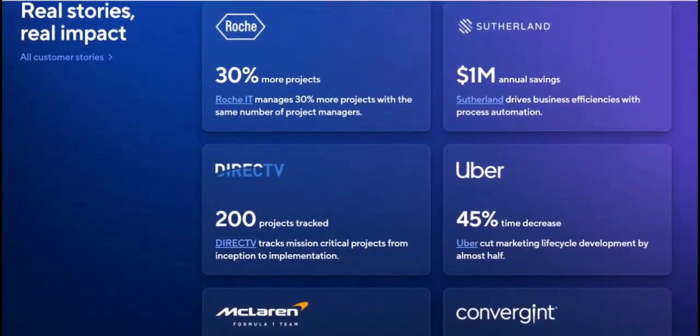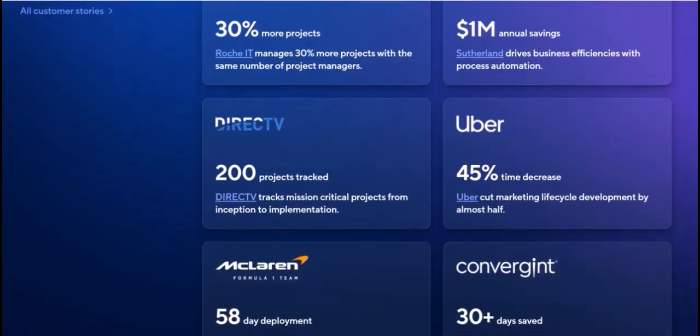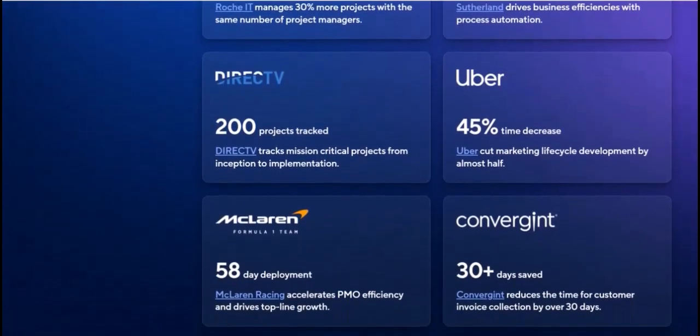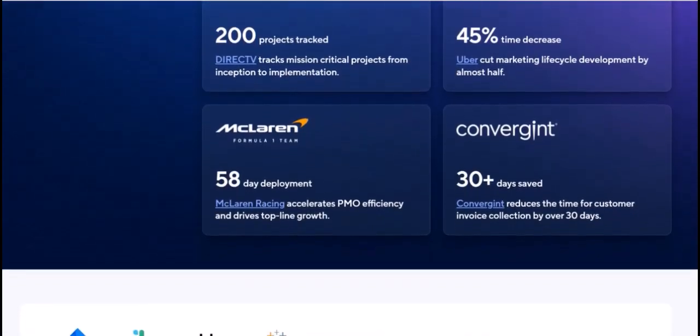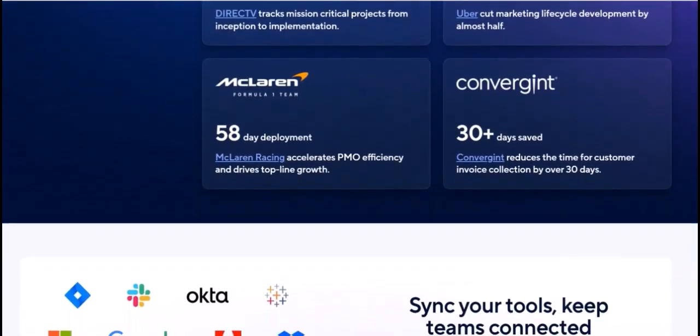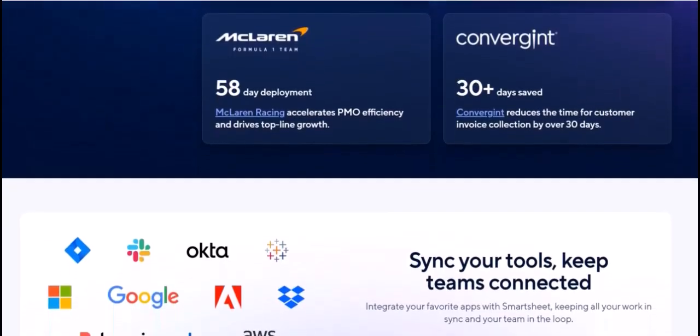Enabling and locating the Gantt view. Look at the toolbar on the left side of your screen. You'll see three main view icons: Grid, Card, and Gantt. Click the Gantt view icon to switch from the standard spreadsheet view to the visual chart.